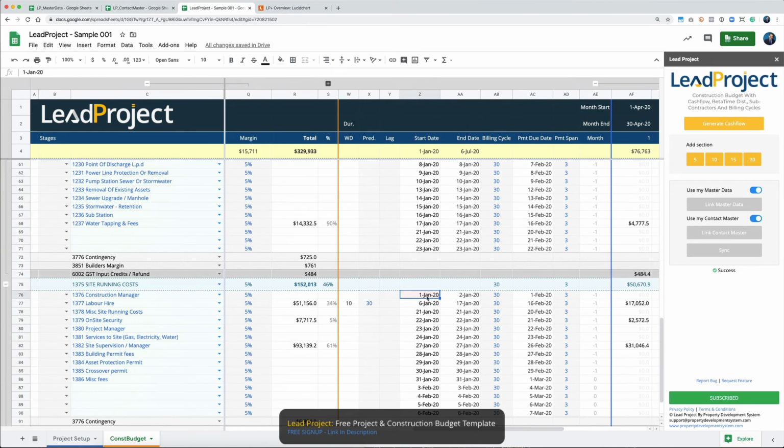The reason is that this is the first row that you've got. And the best way to do that is have a predecessor for that, which is usually the end of the task that you've got up there. So if I change this thing to maybe 68 or whatever, all this can be independent. You can click on any of these dates and select a start date independently. You can allocate the number of work days. You can allocate the predecessor.